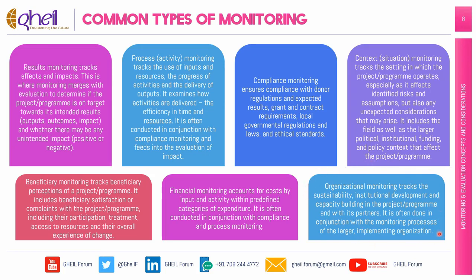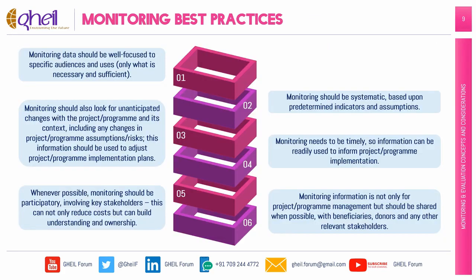Organizational monitoring tracks the sustainability, institutional development, and capacity building in the project program and with its partners. It is often done in conjunction with the monitoring processes of the larger implementing organization. For example, a national society's headquarters may use organizational monitoring to track communication and collaboration in project implementation among its branches and chapters.